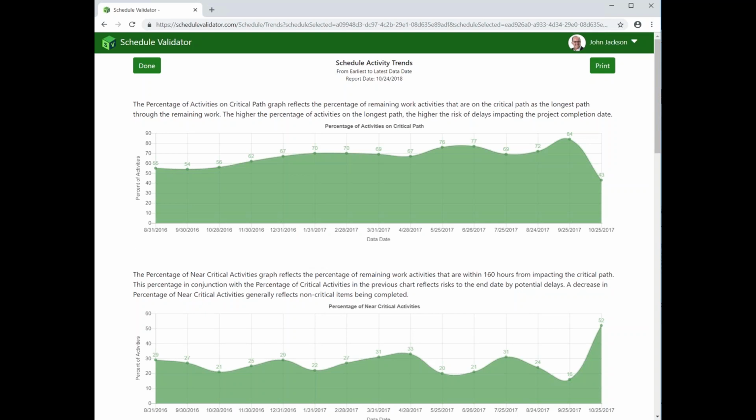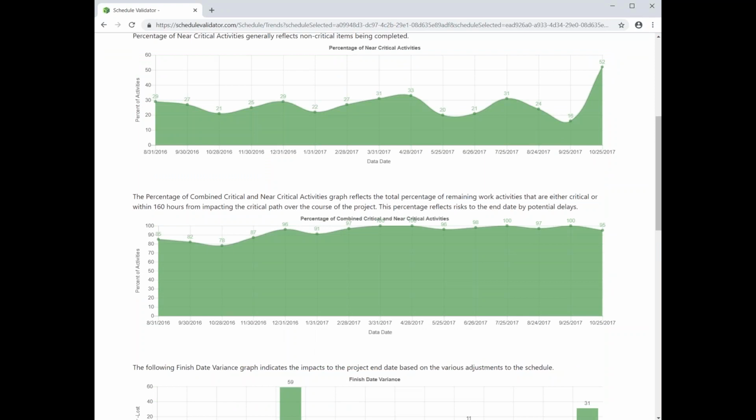So these are really good trends reports, just getting the overall picture. It also shows activities that are near critical path. What you can do is run those little diagnostics. If you want to do this on a spreadsheet, because the diagnostics part of this tool is free, you can just have someone put the percentage of critical activities on your spreadsheet month to month, and run these trends reports on a spreadsheet. This will identify a lot of your risk associated with your schedules.